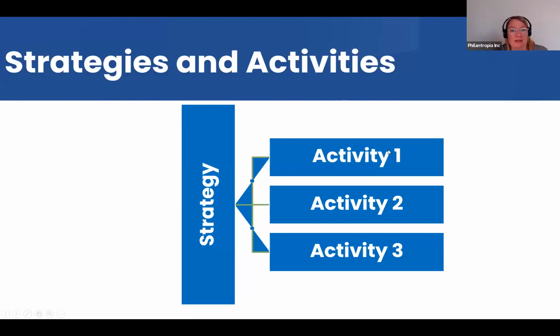So whatever it might be, like teach the teachers' helpers, train the teachers, train the administration personnel. Those could be 3 activities. Or if you run an awareness campaign, one activity could be a festival, one activity could be a workshop, one activity could be house visits, something like that. So those are the things that actually describe your plan, what you want to do step by step. And it's crucial that you keep those 2 apart, that you describe your activities, what you want to do, and then you describe what you want to achieve with those activities.